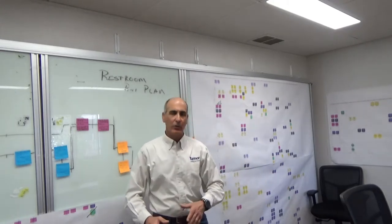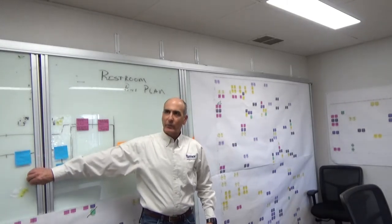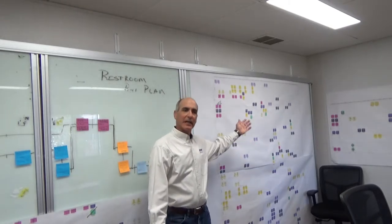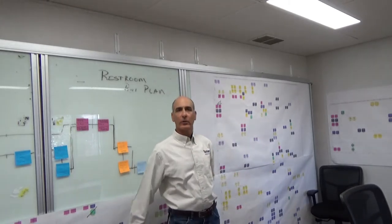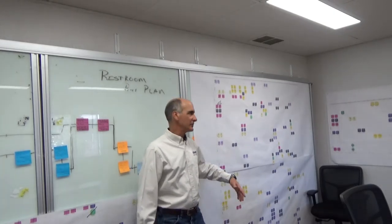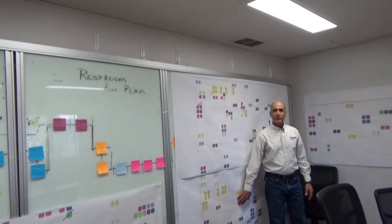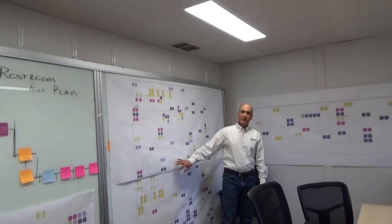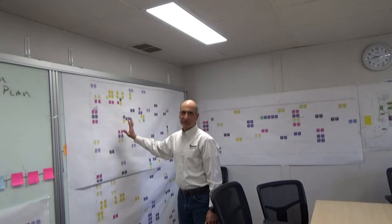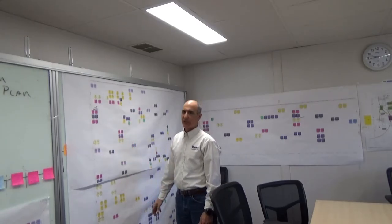In the foreman's meeting, we only talk about week 4. We fine-tune the commitments in weeks 1, 2, and 3, but we focus on forecasting. It's all about reliable promises. As we finish, we take week 1's board off, slide it off the end, put it on the other end, and that becomes week 4. That's where the subs work. This is in the conference room so that everybody, not just the foreman, can see it.